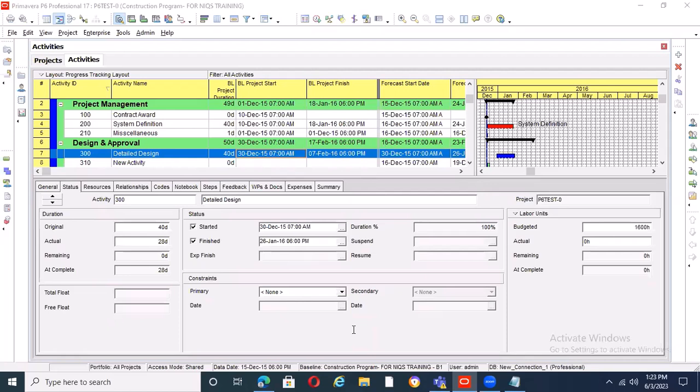And as a contractor that has deep pockets and access to loans, he had bought these materials. He's saying that by the time he bought the materials, it was inspected, they had cracks. I think it was during storage that they had cracks. So he bought them early, at foundation level, and we said we are not going to pay until you install those things at site. So by the time it was about to be installed, and we looked at the materials, they were rejected, and it became a big issue. So at the end, I think they came to a win-win and did a 50-50 pay.